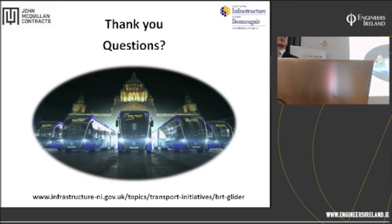Okay, Bert, thanks very much. The first question with regards to utilities, as statutory undertakers, they have certain authority to provide new connections and to carry out emergency work for failures and things like that. So the department can't hold those utilities for those particular types of things. However, there is an embargo on planned utility works after the completion of major roadwork schemes. I think that's only 12 months or 24 months, I can't remember what it is. And thankfully, some of the utility providers took the opportunity to proactively upgrade some of their infrastructure.